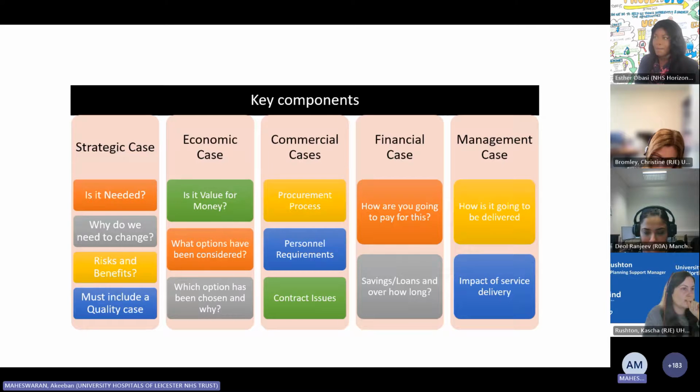They have to use that for 10 years. Most other bits of kit will go out of date quite quickly. So there's no point signing up to a 10-year program unless it has an automatic upgrade process within it, because otherwise you'll be stuck with kit that nobody wants to use in 5 years because the kit improves.